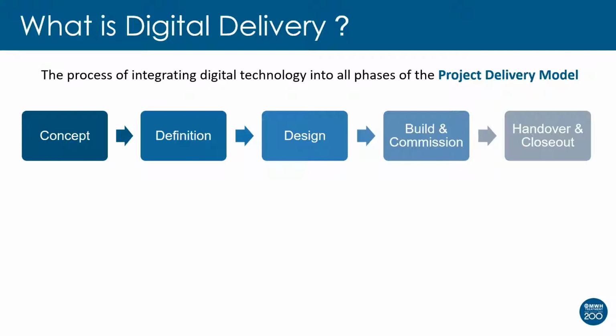Because a real key part of the water treatment sector is that when we're delivering a project, it's not like a new build, it's not like a commercial building where we start and finish. We're often adding to, modifying and extending an existing operational asset. So it's really important that we understand how the project's going to be built and commissioned, such that we do not interrupt the supply of that site, whether it's supply of clean drinking water or treatment of a sewage process. And then, of course, at the end, we've got handover and closeout, as you'd see on any